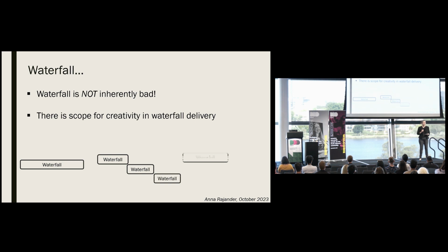Also, there is some scope for creativity in waterfall. There is a lot waterfall can learn from agile principles. For example, waterfall delivery can make use of agile techniques such as retrospectives to keep a team connected rather than working in delivery silos. Or you could use things like showcases to keep stakeholders informed and engaged throughout the initiative rather than engaging at the end when you're ready to implement.